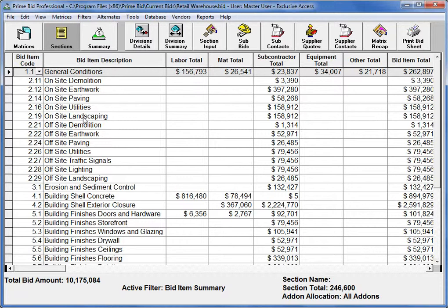Now, owner-supplied breakdown structures are common. They could be like this typical example, which you see in a lot of different retail bids, but another typical breakdown structure could be hospital, medical clinic, parking garage, and site. Or they can be phases of a remodel, phase 1, 2, 3, and 4, and have costs broken out by different phases or different buildings on a project so that you can summarize this information. You can look at the details for this information by having your bid file organized to take advantage of the bid items and the bid breakdown structures.